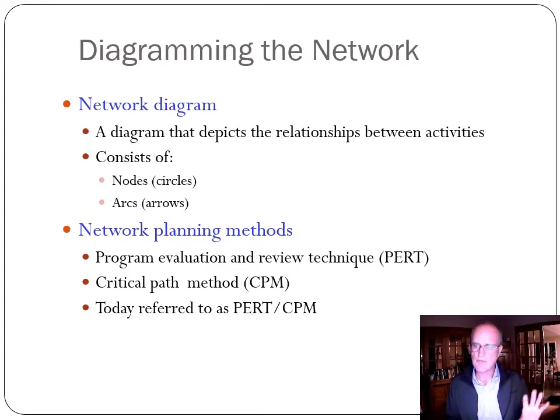There is another approach that I'm not going to focus on. It's not my preferred approach, but you can see it in various operations textbooks. That's called activity on arc, where the activities are actually the arrows, and I think the activity on node approach that we're going to cover here is more straightforward and easier to follow for students learning project management. And program evaluation and review technique, PERT, and critical path methods are what we're describing in this and subsequent videos to introduce the concepts in project management.